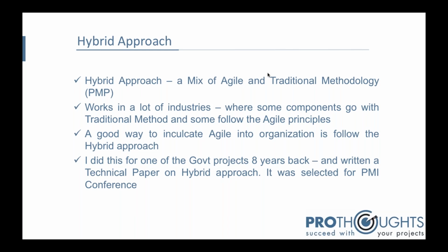But if I do the entire compliance project, I would discover a lot of errors after I completed the project. So rework would have been more, and that's one of the drawbacks of a large, traditional project. But sometimes, just because a regulation is required, you need to follow a traditional method.